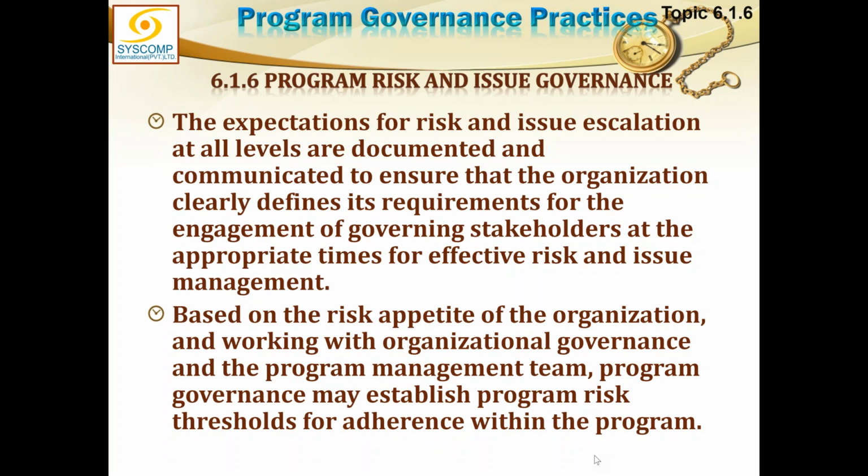So for all the problems we had to wait for 3 months. This is no way of having escalation. If the escalation has to be heard only after 3 months, there has to be an accelerated process. There has to be an emergency process. The problems can't wait for 3 months. So governing stakeholders must be made available.